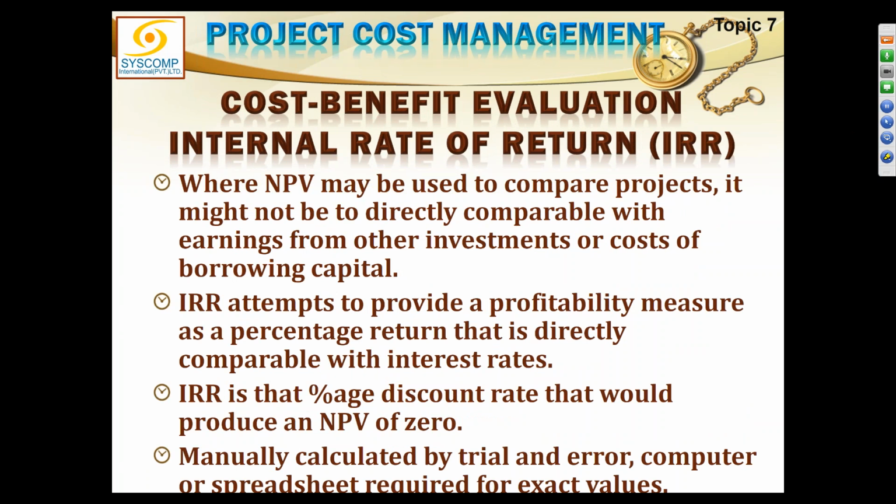Now, internal rate of return applies exactly the same formula which NPV uses, with the difference that it does not have a discount rate. We do not know the discount rate. We have to find the discount rate in IRR. Why? We don't want to take the rate the State Bank of Pakistan has given us, because that is for banking purposes. What is the internal rate of return of my own project or my own business?